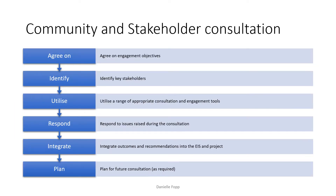Community and stakeholder consultation — what are we looking to follow through this process? We need to agree on the engagement objectives: what are you looking to achieve from the engagement? You need to identify the key stakeholders for the project. The key stakeholders will vary with each project — they will not be the same. They may be variations of the same types of groups, but for each project it's important that you identify key stakeholders so that when you conduct your consultation you're not missing anyone out.